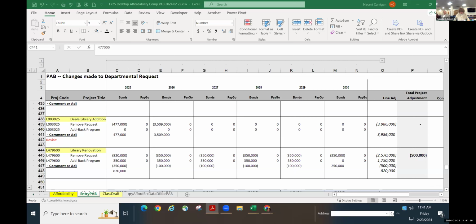You mean take out the new project request and put the 477 as an additional project planning study? Yeah, we've done that on a couple other occasions, so that the project would still in some levels continue to move forward, but it's not 100% commitment to the actual project at that juncture.